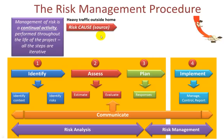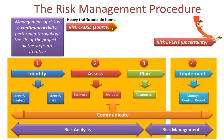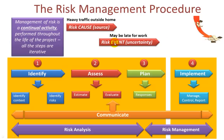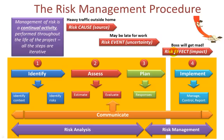One of the main problems with risk management is actually identifying risks correctly. The way to get this right is to remember that there are three steps. First, you have the risk cause or source of the risk — let's say heavy traffic outside your home. Then the risk event itself, the uncertainty: due to heavy traffic, you may be late for work. And finally the risk effect or impact: the boss will get mad. If you think about risks in this way, you'll be a much more effective manager of risks.